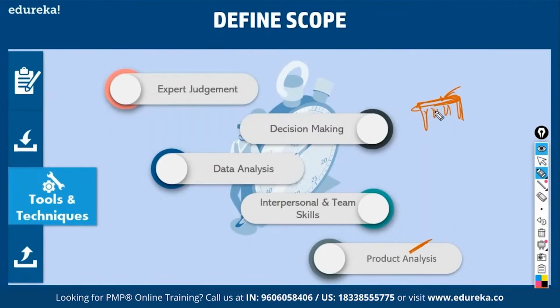So you break down the product into smaller and smaller components, and you understand what value each of these components contributes and at what rate you can buy without compromising on quality. That is, you have to maximize value and minimize cost without compromising on quality. This is what is called product analysis. Some people call it value engineering, systems engineering, functional analysis. Whatever it is, you have to do all this in order to define a product.